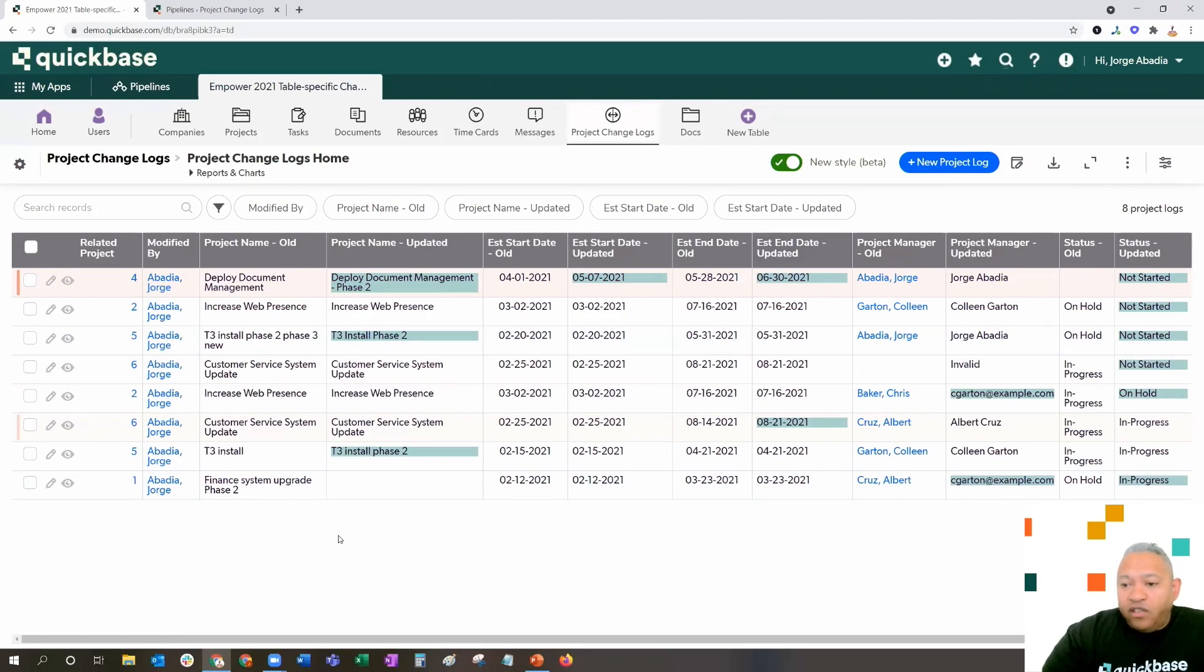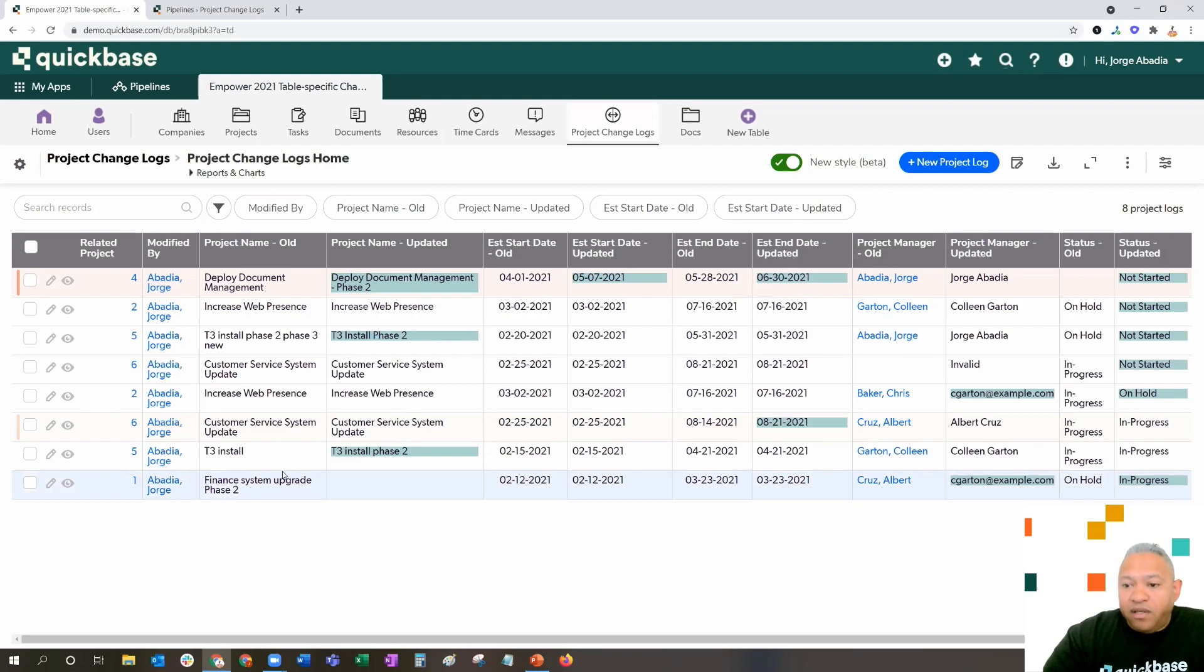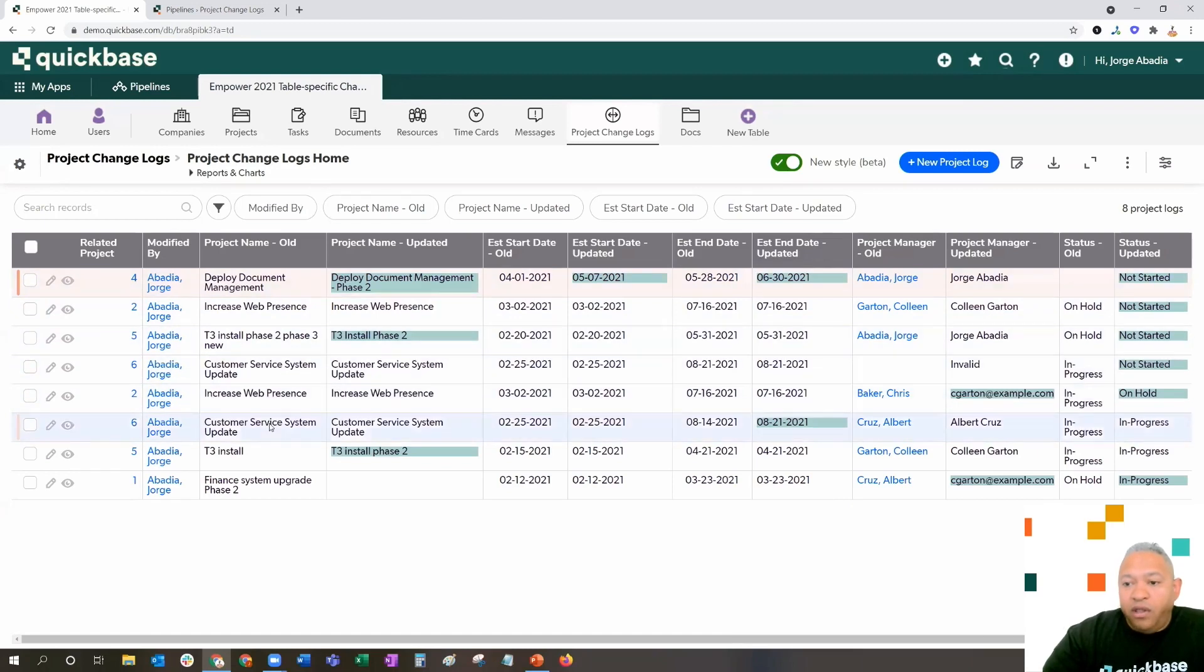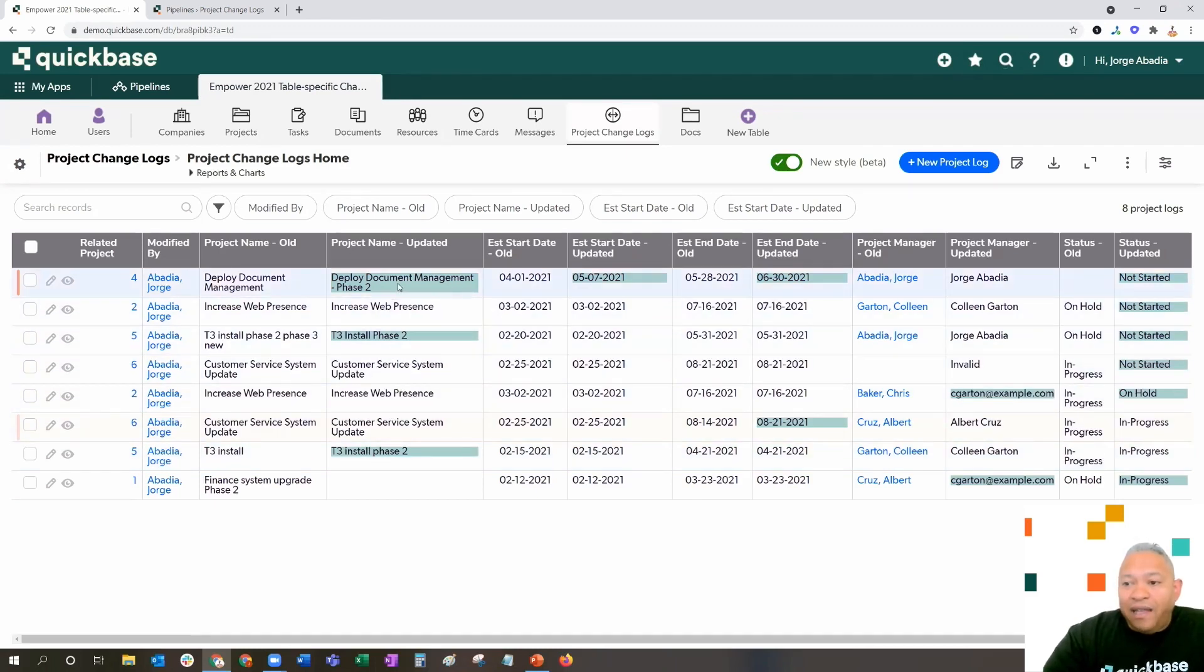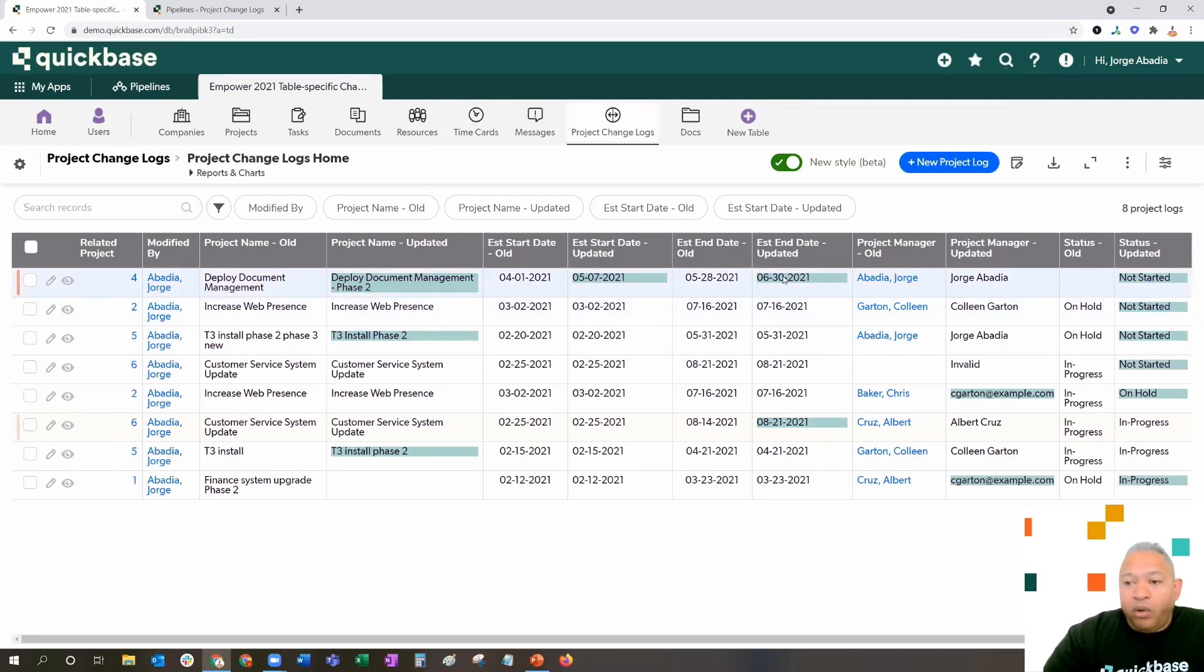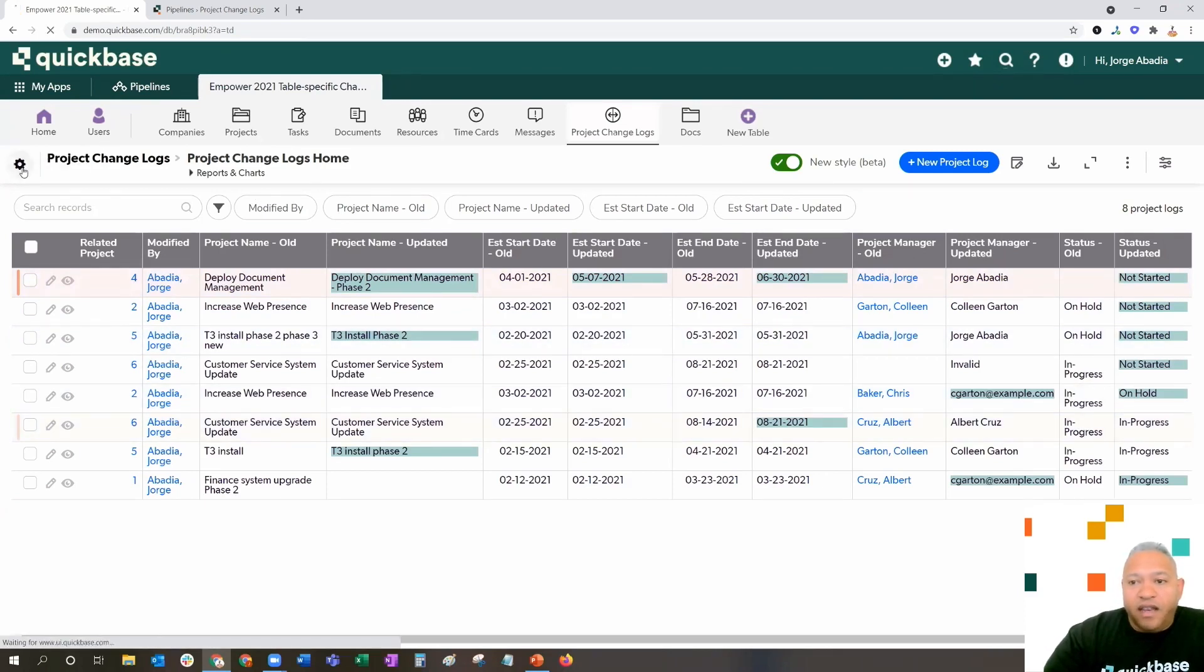We did some really interesting things here to this report to help you call out specific problem areas. As an example, if a start date or an end date was pushed back, we color-coded the entire record. But, in order to help you identify, when you're looking at this, which fields specifically changed in this record, we've actually highlighted the fields that are different from the previous values in order to make them more noticeable.